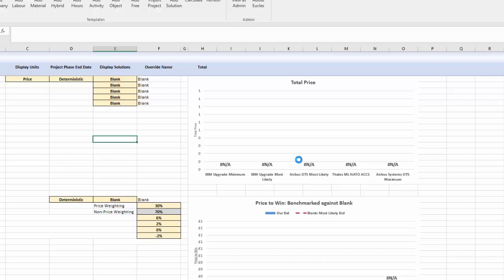Well, in simple terms, you've got to consider that when you're doing a lot of different models with a lot of different people doing them, then it's going to be really hard to ever understand how good your estimates are if they're not in that standard format that you can go back and check and understand, and understand what assumptions were made. For example, if you're in a company and you're building some kind of aircraft, before you do your estimate, you might want to say, well, look, we built an aircraft 10 years ago. What were the assumptions we made then? How accurate did it turn out to our actual costs?